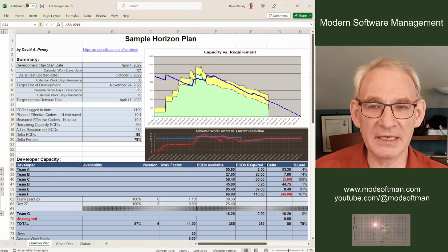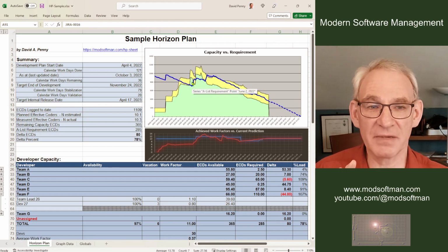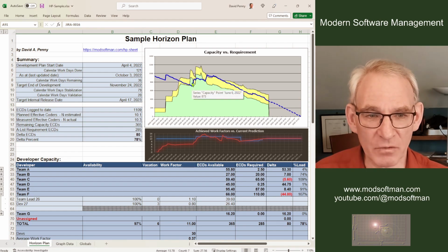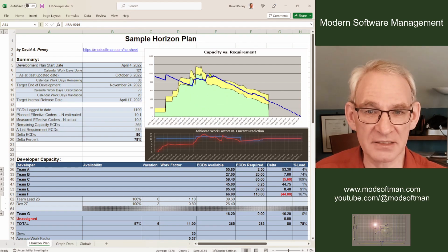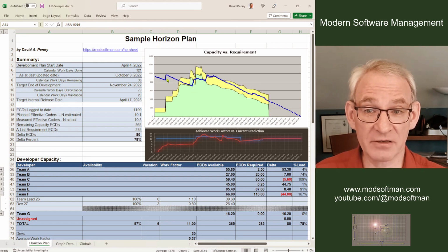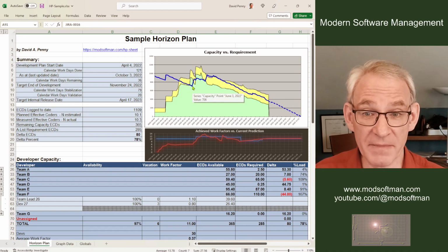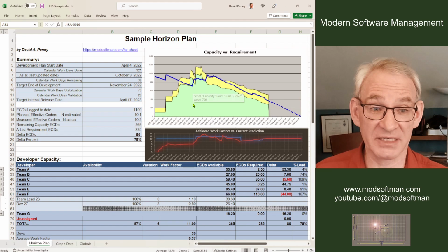And so the whole plan kind of artificially revolves around this 1 or 2 pins that you've put in the plan. So in early days back here, you want to still keep it fairly loose about when the end date is and what the feature content is. And if you do make promises, make it kind of directional promises rather than more specific promises. Because back here, that gives you the freedom of still being able to move the dates. An important thing is, these are date moves. They aren't date slips when they're happening back here. A date slip would be if it happens here, right? That's a slip. These are proactive moves of dates that are going on here, where we've determined that the best release would be one that takes a little bit longer but has a bit more stuff in it.